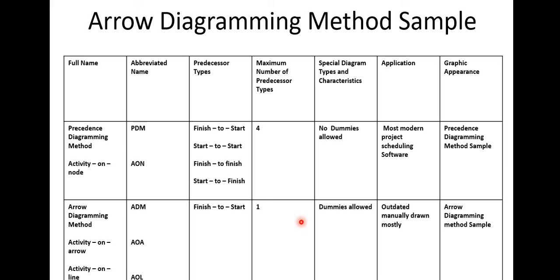But we need to also look at this. Let's compare the PDM and the ADM. Now the ADM is old and it's no longer in use. The PDM, you don't really see the diagram either, because nobody now creates this diagram manually anymore. The projects we do today don't even allow some of those things anymore because they are huge, bulky, and complex. So what do we do now? PDM is now the foundation of most scheduling software, like MS Project and all of those, and even the mobile ones we have on our phones. PDM is the principle that they all work on.